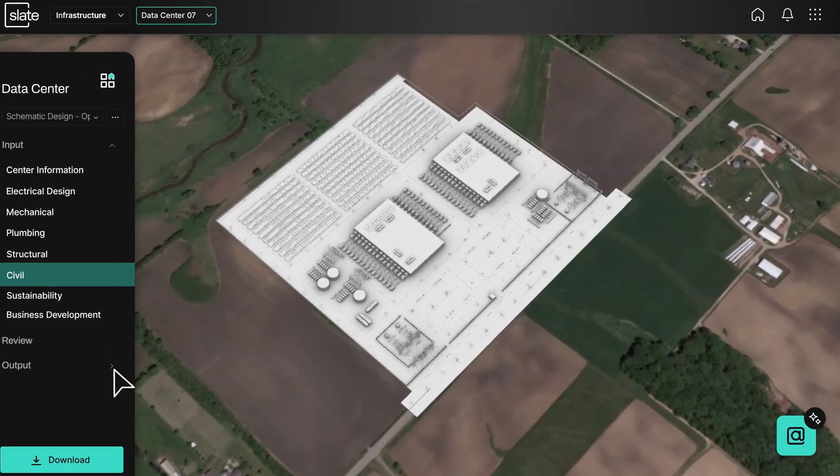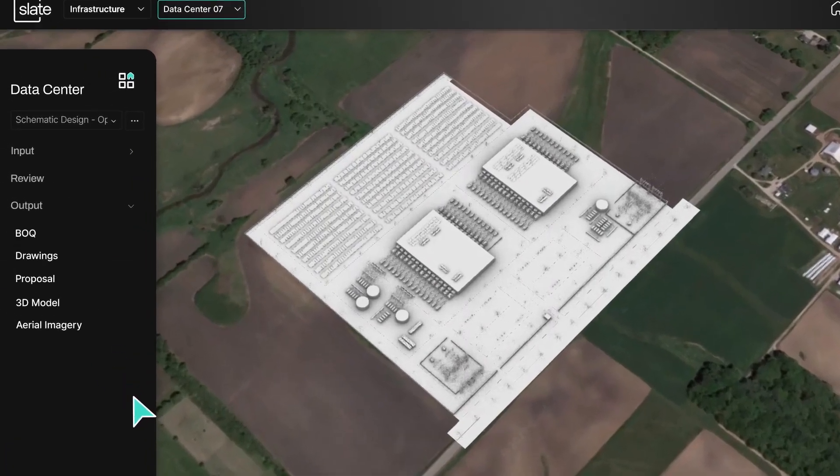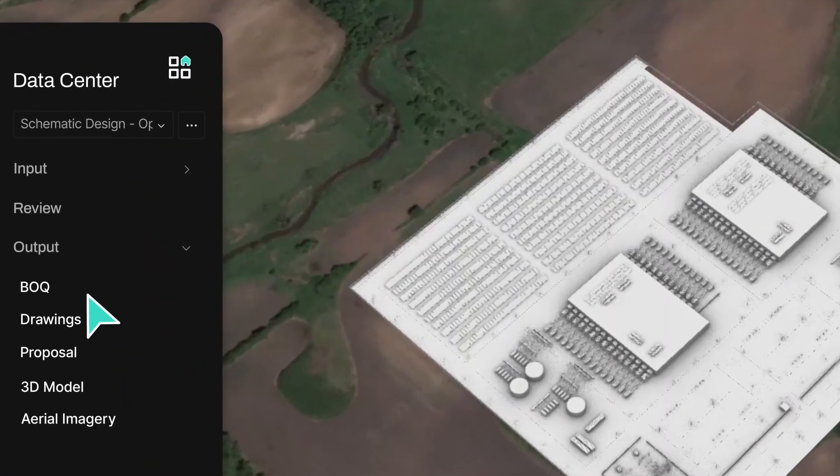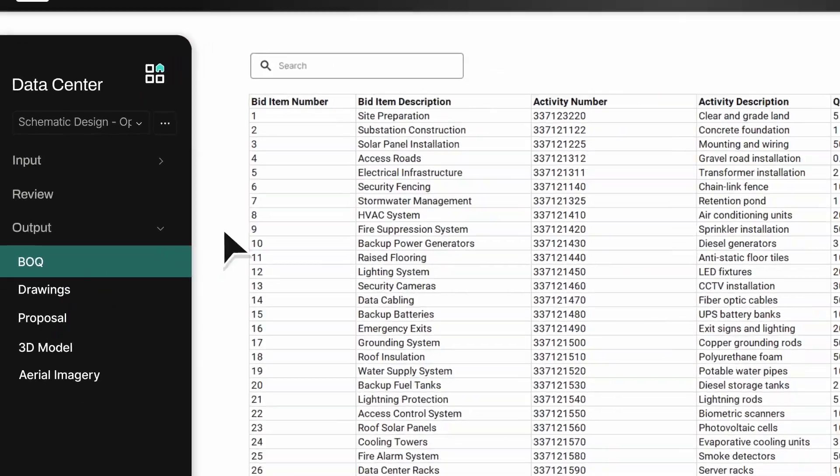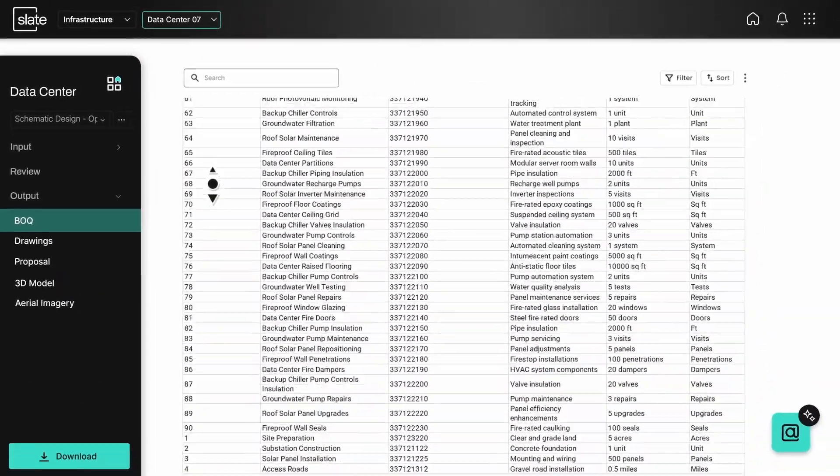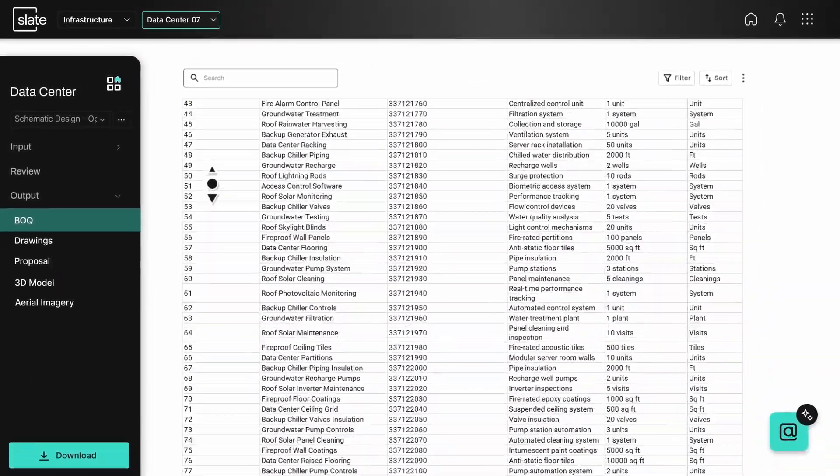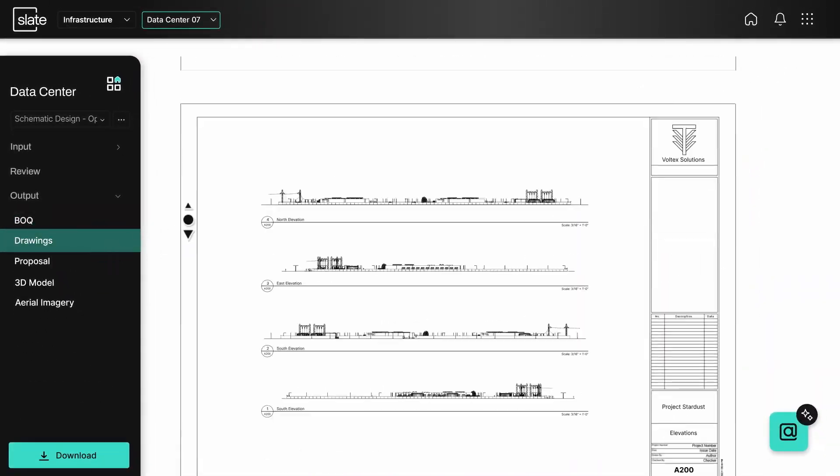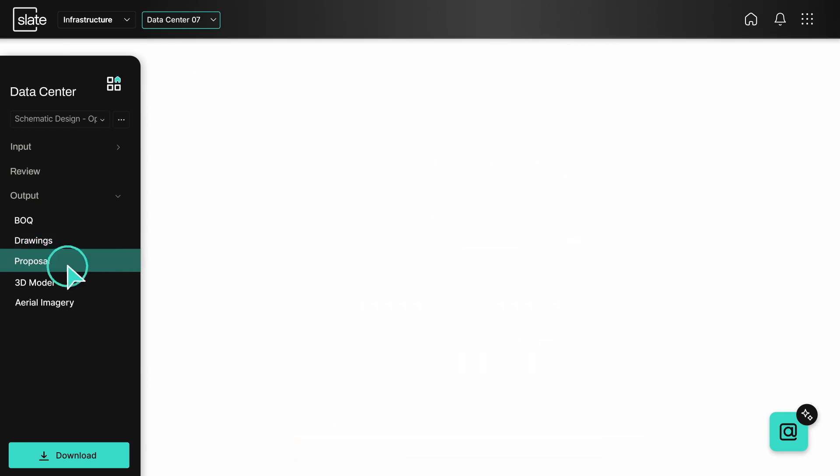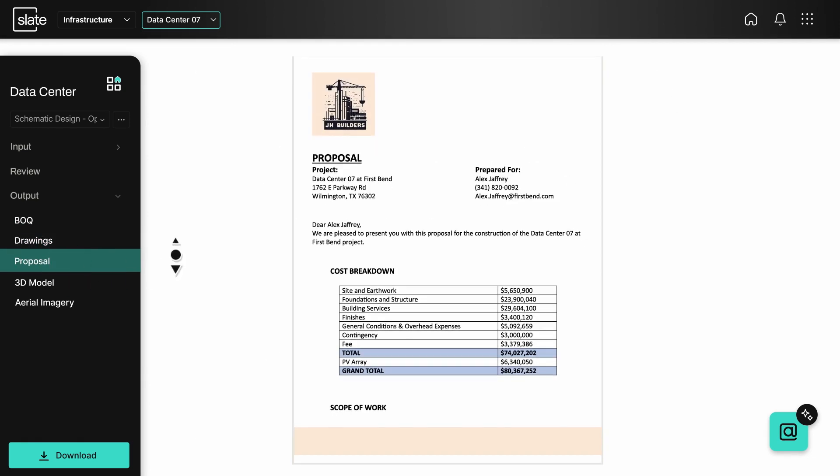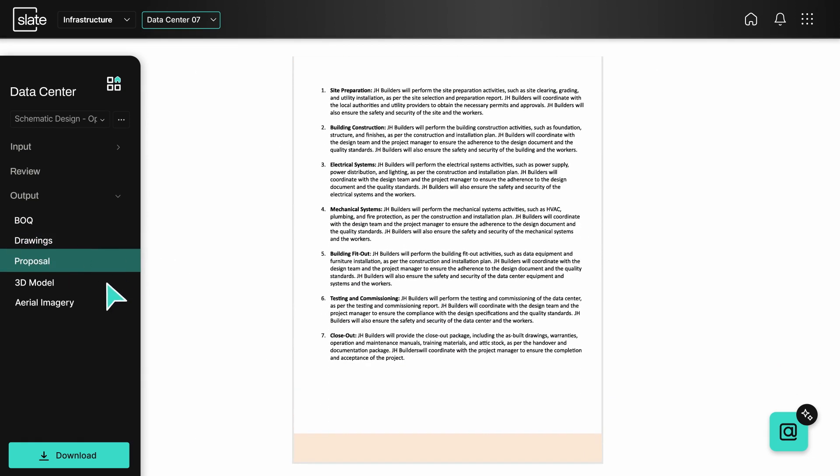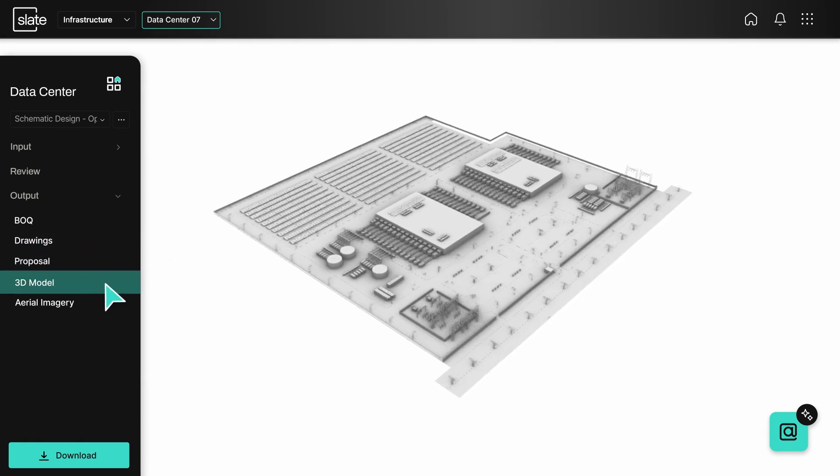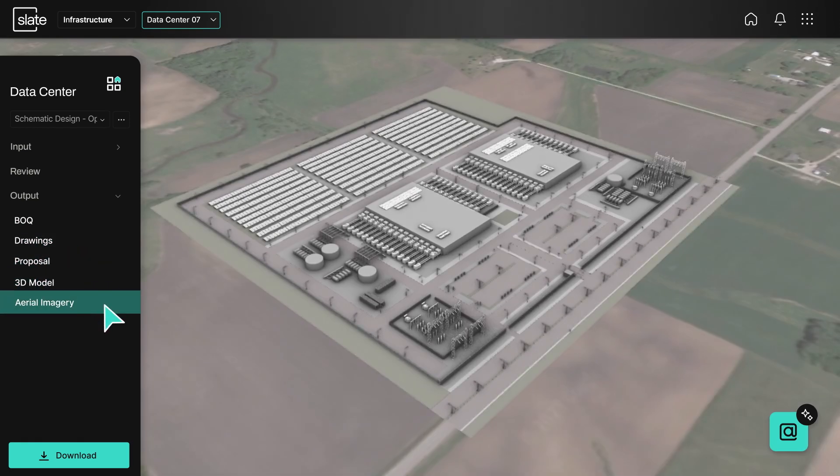Generate then automatically creates the outputs you need in a variety of file formats including your bill of quantities, drawings, proposal, 3D model, and aerial imagery.